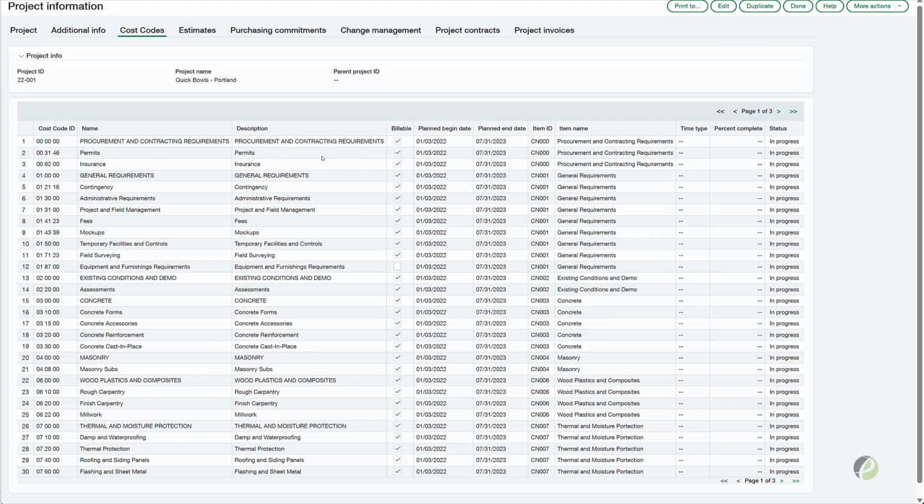And this is something that we could always import into the system. We have the ability also, if you see this duplicate button, we can duplicate so many things, most things I would say in Sage Intacct. It could be something as simple as a transaction that we duplicate as a real-time saver, but it could even be for a project setup itself. So we could set up a few sample template projects that we duplicate when it's time to make something new to speed things along. And they can come along with all these different cost codes already in place. And then you can modify it from there.